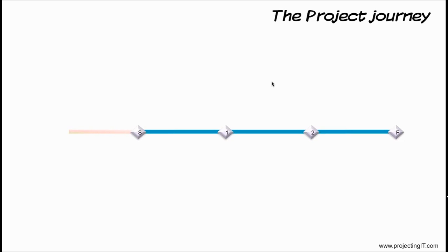Before we can start the initiation stage, we do a feasibility study of the project. You can call it startup or pre-project. This is where we investigate the reasons for doing the project, that is why this project is required. And then the project board will look at whether the project is justified to go to the next stage, in this case, the initiation stage. The project board provides the project manager with resources to carry out the work of planning.